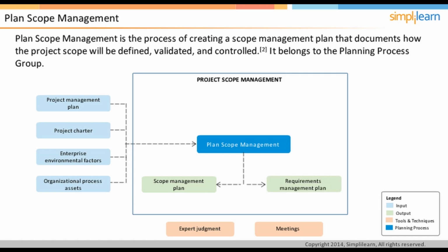The Requirements Management Plan is a subsidiary of the Project Management Plan that describes how requirements will be analyzed, documented, and managed. A requirement is voiced by a customer or a stakeholder, whereas scope represents what the project team will do or deliver in order to meet that need. The Requirement Management Plan may also describe how the configuration management of requirements will be carried out, how they will be prioritized, how the metrics will be used to rationalize these choices, and how the traceability of the requirements will be maintained throughout the project.